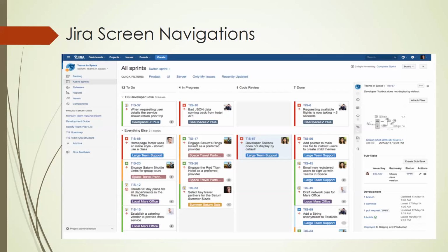And then you have multiple aspects to be considered in terms of business value and complexity points and other areas. So once I'm done with all this, the Scrum owner will start assigning the user story to each individual developer, giving them a sprint time. Sprint 1, 8 people, they have 10 stories which they have selected. It will be assigned to them with the index stating you have chosen this part of work. Please work on this. Your sprint duration is 1, that is 1 week or whatever.